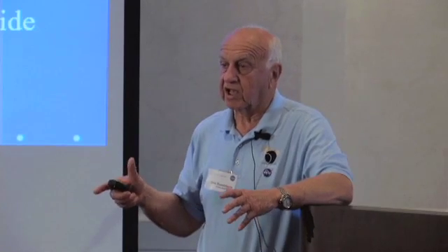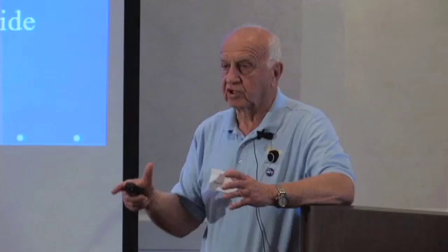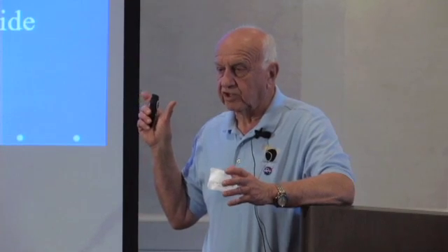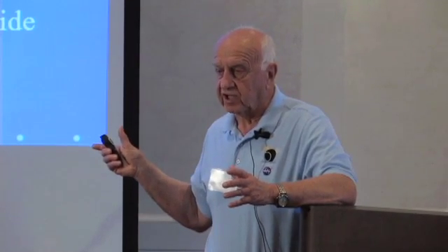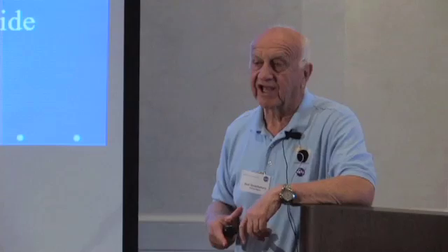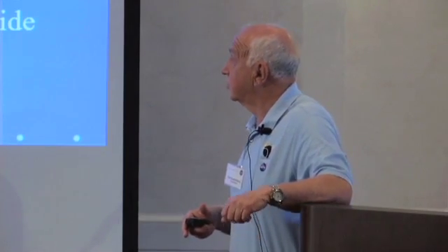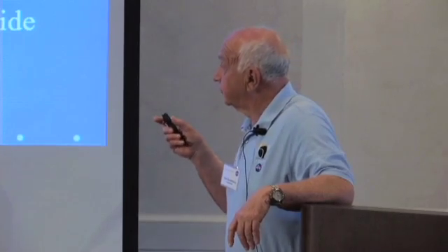They came back and we either did it or didn't do it, and it was our way of staying within the cost box by being very, very diligent about exercising. And the 150 would get changed each week, we only have 135 left because time pushed out where we can't get that saving or we can't get that activity, and it became a very good thing.